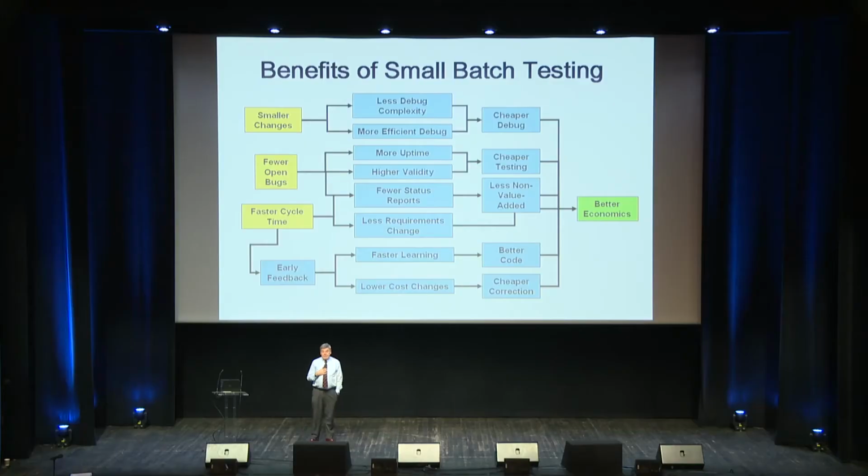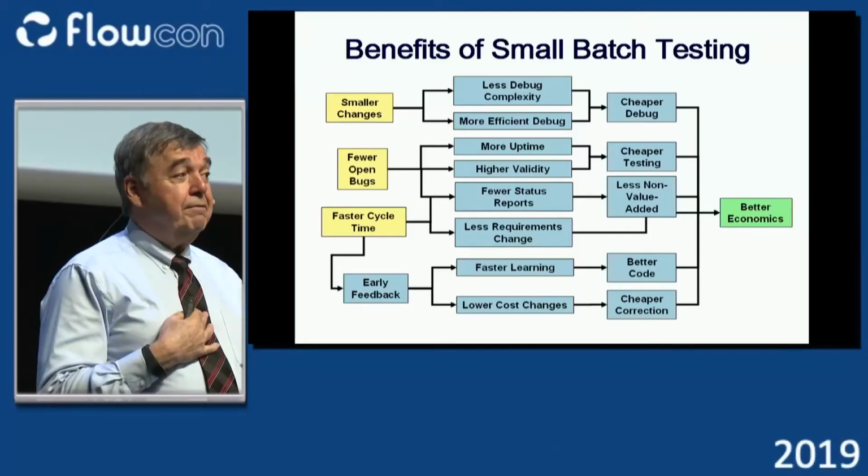They went to the two guys there up in Boise, Idaho. One guy's name was Brett Dodd. The other one was Sterling Mortensen. They went to their boss and they said, we got a really good idea to reduce batch size in firmware development. 6 months later, they had cut work in process by a factor of 10, and the cycle time through their process was 10 times faster, I think.